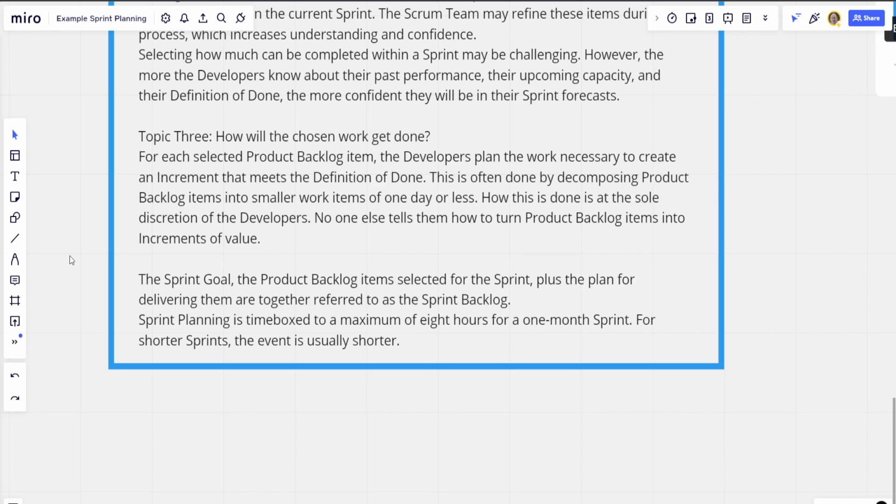All of that gets placed into something called a sprint backlog, and that's fully developed by the team. For some of you new to Agile practices, this is essentially the team coming up with the plan. It's not a project or program manager or CEO or manager just coming in and saying, thou shalt do, and dictating the work. The team selects it and creates the sprint backlog, which is essentially their offer to get that valuable increment of the product completed.